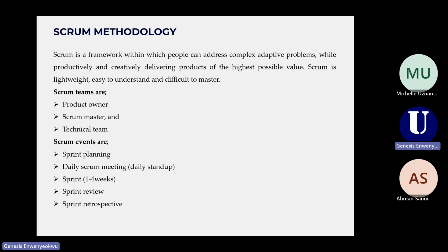Now, that 2-week sprint is considered a period of time that the team has committed themselves to delivering a piece of work. So let's assume we want to build an e-commerce platform like Amazon, and we break down the different components of Amazon: the home page, which is what people will see first when you type www.amazon.com, the landing page. Then the account creation page, the sign-in page, the cart page where you move items to cart, the inventory or categories page, the cash out page, the payments gateway page, all of those things, right?